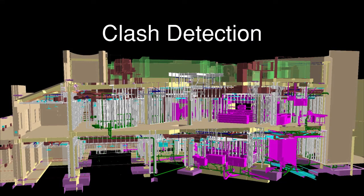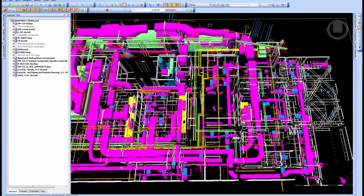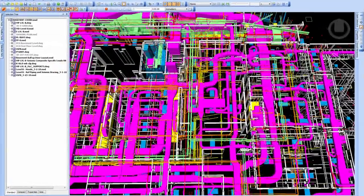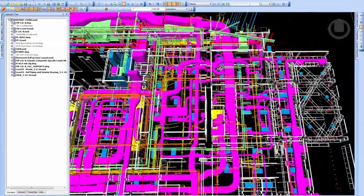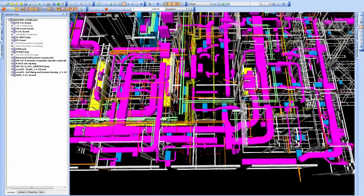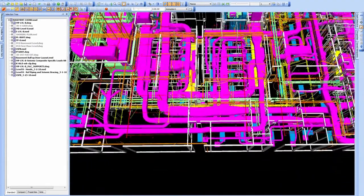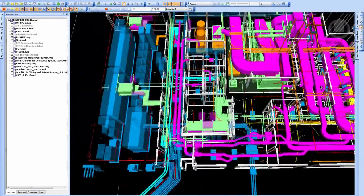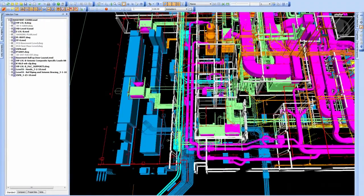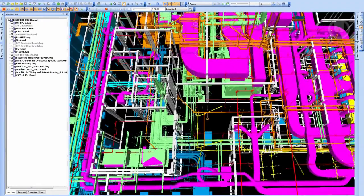Clash detection is a process of making sure that all the different building systems fit. What we use for that as our main tool is Navisworks, which allows us to bring all of the different file formats together into a single program to make sure that everything has enough space to fit.